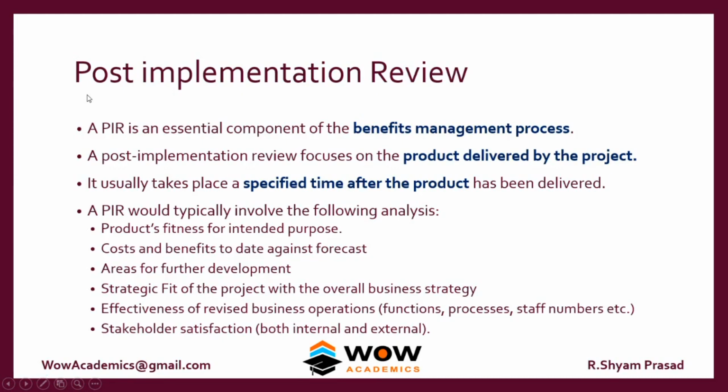But the construction is not the main idea. The main idea was to reduce the traffic, to improve the safety of people and to reduce the time of travel. See, these are the main aims, which are beyond the aim of constructing a metro train. So has this aim been achieved? This cannot be done immediately after the completion of the project. It has to be done only after some 3 months or 6 months time interval.